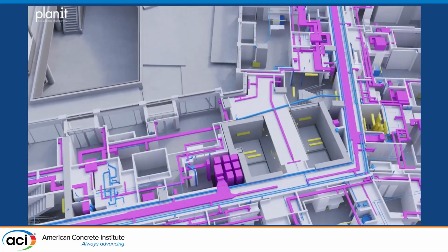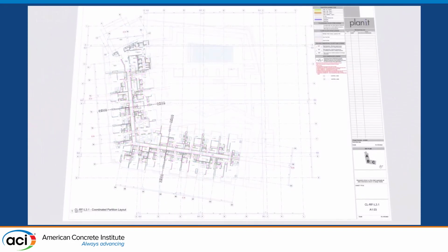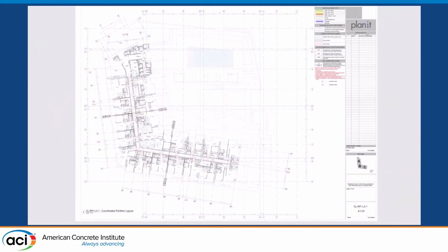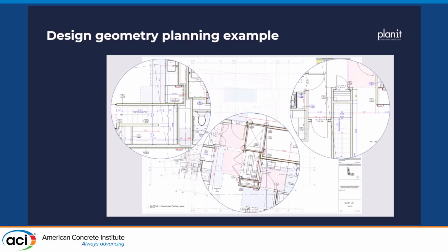Then we do MEPS coordination. That eliminates the issue that many MEP contractors tell us: hey, all this BIM coordination doesn't help us if the framer doesn't frame what's on the drawings. The reason that the framer doesn't frame what's on the drawings is what you just saw. In the field, they need to make the corrections at some point in time, and then you wonder that the next subsequent step doesn't work anymore.